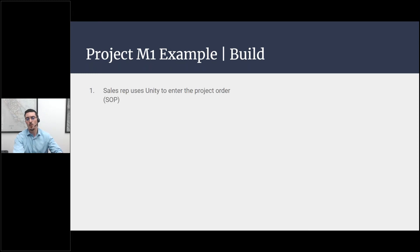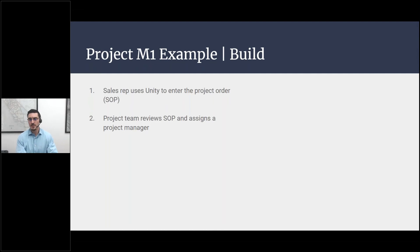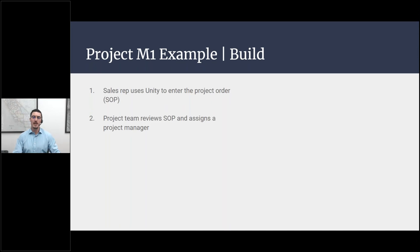So the first phase is the build phase. First, the sales rep uses Unity to enter the project order — the SOP I showed earlier. Then the project team reviews the SOP and assigns the project manager. Reviewing the SOP is critical: every Wednesday our project team — including our VP of Software, plant managers for Sunnyvale and Sacramento, and our senior architect project manager — reviews every approved SOP in the system. If needed information is missing, the sales rep is notified and the SOP cannot go forward to process flow creation.